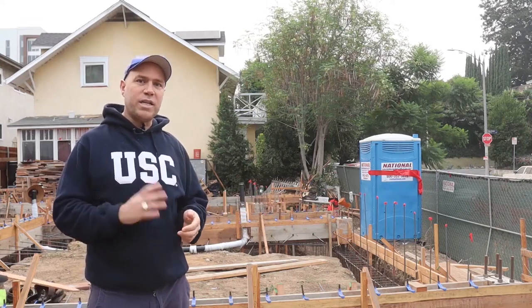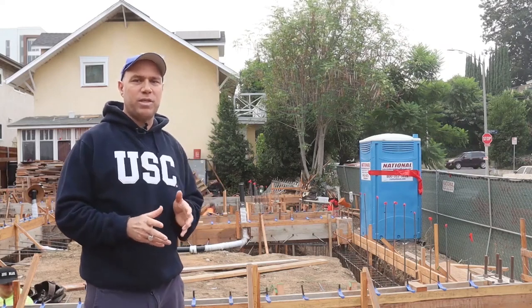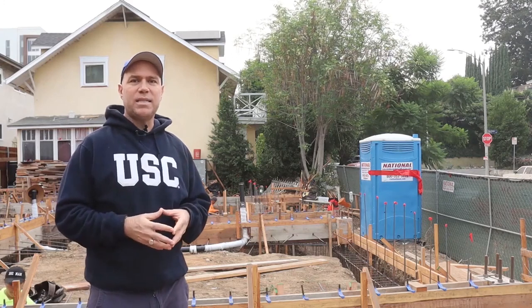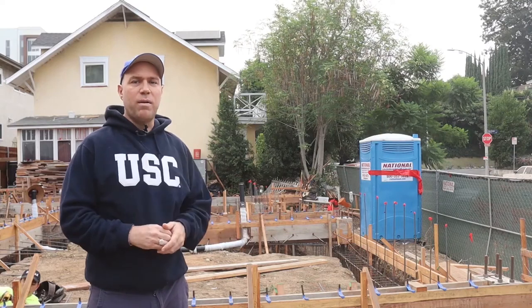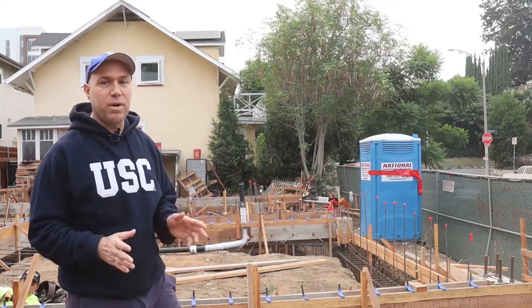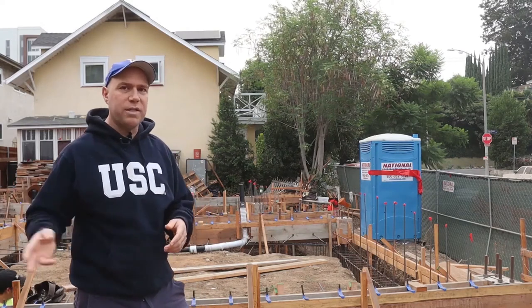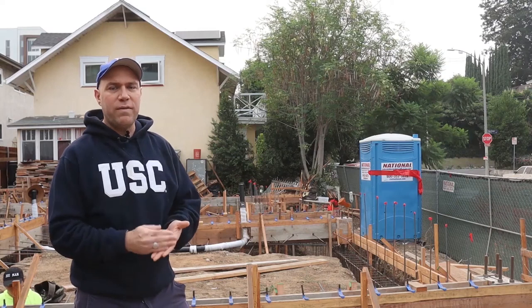So it took 4 years to get to this point, but to actually build the building is gonna be pretty quick, which is probably like, I'd say 6 months, and that's because I'm new and we're going kind of slow, but I think someone that knew what they were doing could probably knock this out in like 3 months or something, probably half the time. Now, we're helping out with some other projects, and those are going much faster because we learned so much from here.